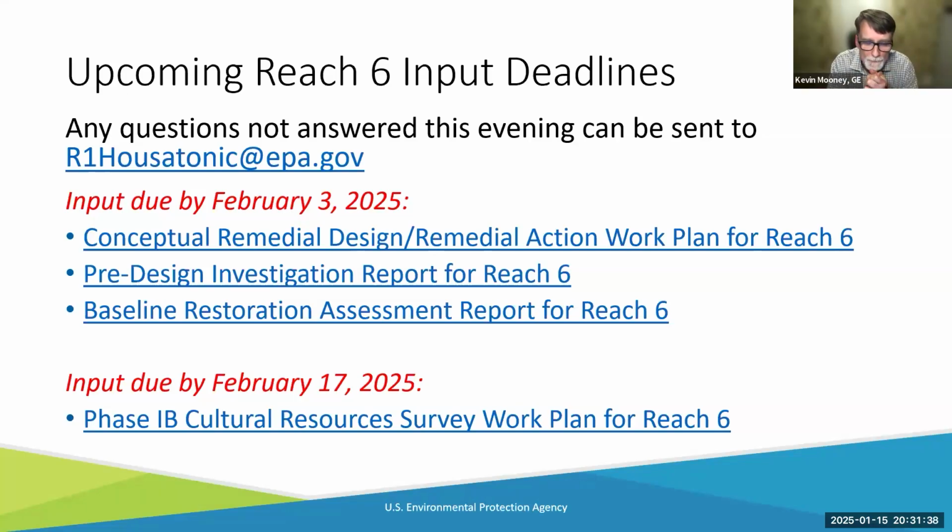Yes, I mean, some of the local ordinances on noise vary. Some of them are not quantitative, or if they're quantitative, they don't relate to the areas that we would necessarily be working in. What we have here are noise standards that are consistent throughout the whole project, and that EPA has reviewed and basically approved in the conditional approval letter of the quality of life plan, which makes sense and is reasonable for the work that we're doing. And again, that is, I think, open to public comment at this point right now.